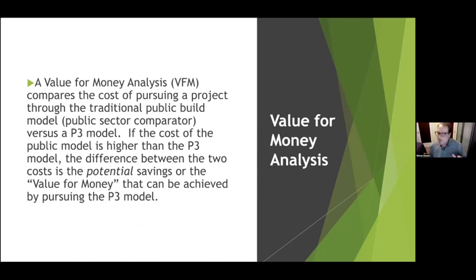So anyways, they conduct this value for money analysis, which is supposed to be an impartial assessment of which building model they should use, the traditional public build or a P3, right? A value for money analysis compares the cost of pursuing a project through a traditional public build model, what's often called the public sector comparator, versus a P3 model.